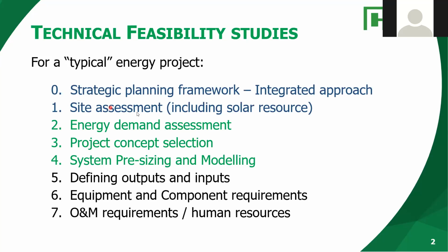Then the site assessment, energy demand assessment, if that is relevant, very relevant for off-grid projects, for grid-connected projects could be relevant or not. We will see that today. The concept of our project, the configuration, the topology, etc. Then we move into sizing, even modeling.